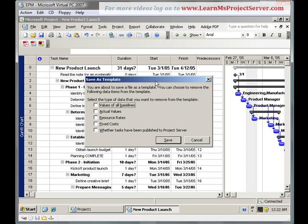When you're having a template, probably you'll not need a baseline because you never know when your project would start. So, you need to clear off all the values for all the baselines. And when you start the project, you can create a fresh baseline for this project. You can take off the actual rates and the resource rates. Again, it's your requirement that you want to keep this information or take off this information. I take off all these values. I don't want any of these values to be stored in my template. And I hit save.